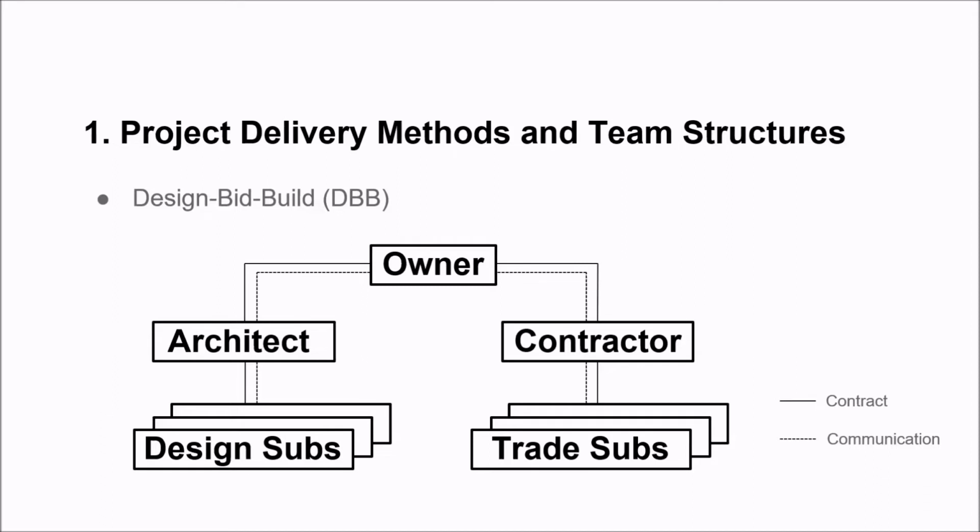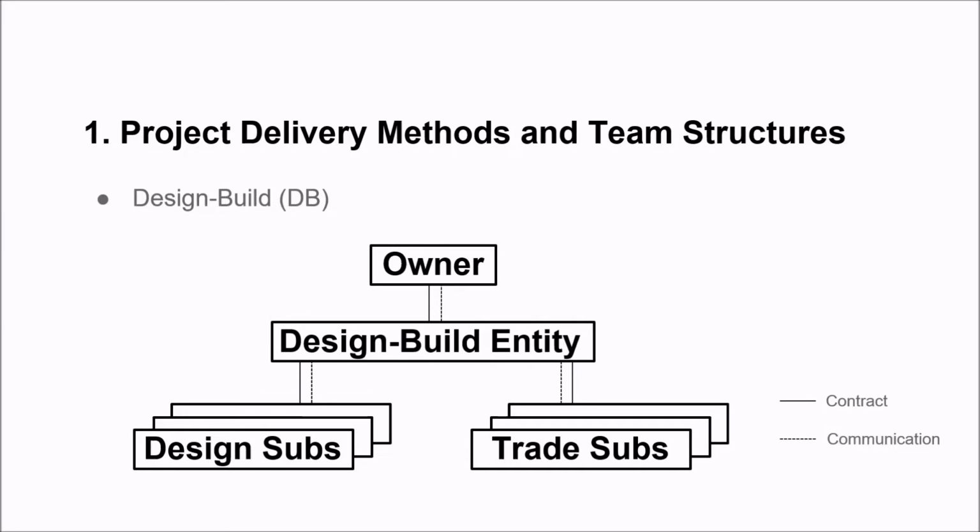The United States can be a rather litigious country to practice architecture in. DBB setup can thus sometimes unintentionally create an adversarial relationship between the contractor and the architect if a contractor has underbid a project, or if an architect has documented something which is not able to be constructed or had incomplete documents at the time of bidding. Design build, by contrast, provides a sole source of responsibility. By and large, this avoids the owner being caught in the middle of any disagreements between the architect and the contractor.